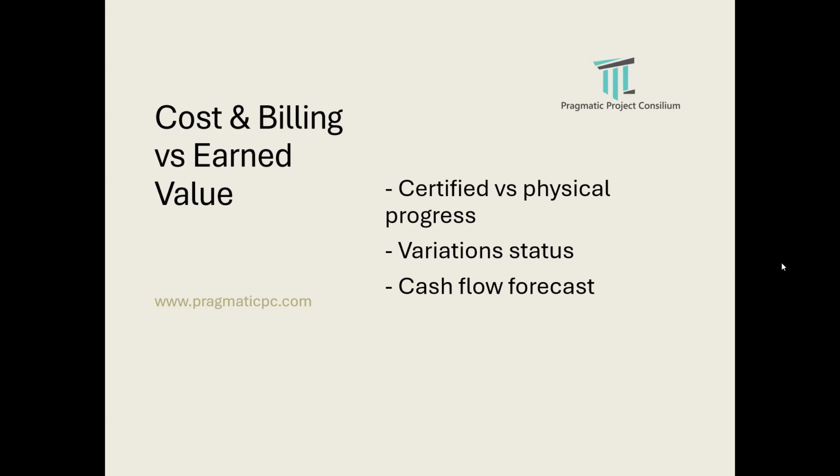And the cash flow forecast should also be there. Cash flow forecast means, most people very easily think that they just give the projection of the invoice. No, projection of the invoice is not the cash flow forecast. Cash flow forecast should be actual, and it has to include the impact of the variations in the cash flow.